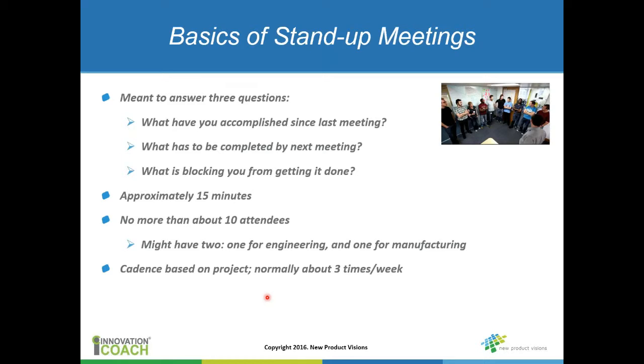Now, the other important point here is that these stand-up meetings are not necessarily going to take the place of your normal core team or project meetings. But the difference is that those meetings, in my experience anyway, outside of the context of using this lean tool, tend to have 2 different topics. One are more strategic type topics, and the other are task-driven type topics. So the idea is these stand-up meetings are really task-oriented.